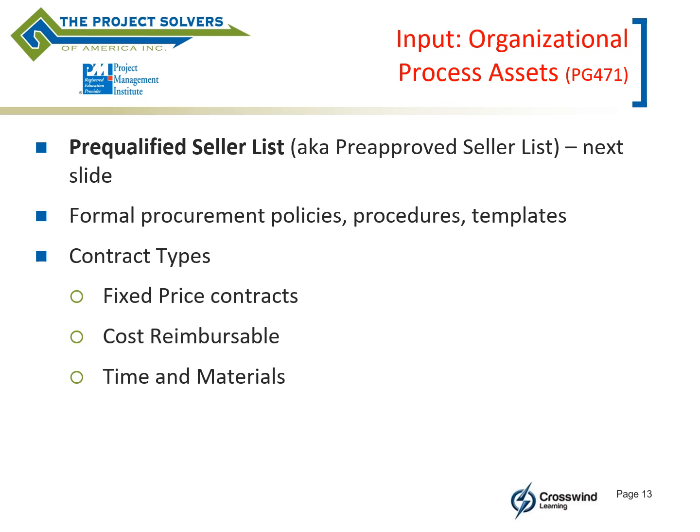So within OPA, you have a pre-qualified sellers list. And the pre-qualified sellers list will depend on your organization, if you even have one. Not every organization does, but basically it saves you time because you don't have to go through the vetting process to find out who's got the availability and who's got the capability to provide what you need.